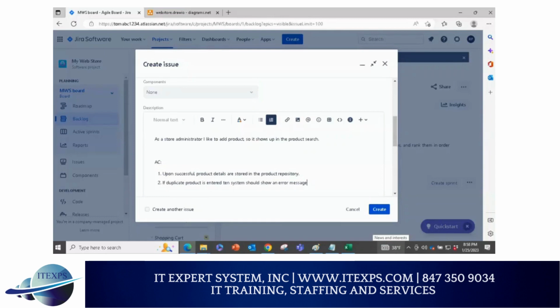Can the product owner change the acceptance criteria? The answer is yes. If they change, again, negotiation should happen. Because if it requires extra effort, something needs to come out, right? Because you cannot just keep adding, right? Something needs to come out because your capacity is fixed. So that's why it's very important you understand acceptance criteria.